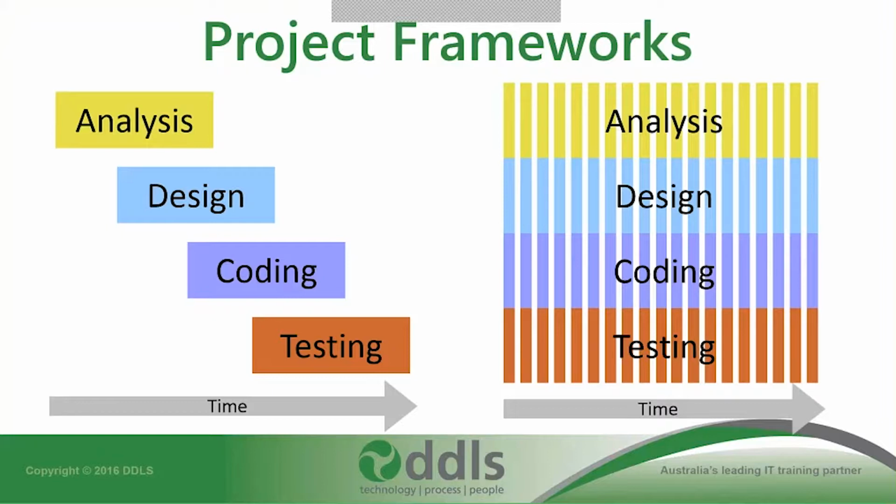In our traditional speak, this was Winston Royce back in the 70s, who worked at IBM and said, hey, to run a project, we need a phase of analysis. We need to go through a period of analysis where we gather our requirements, where we understand what we need to do, and then once we understand that, we're going to design it. And then once we've designed it, we're going to build it, we're going to test it, then we're going to implement it. All of that is sequential. So what we know this better as is waterfall. A waterfall is sequential, almost one way, we don't really cycle through much.